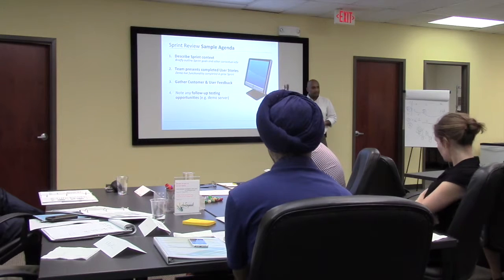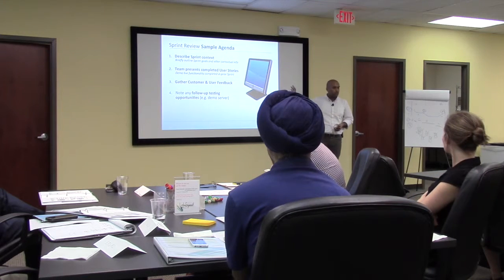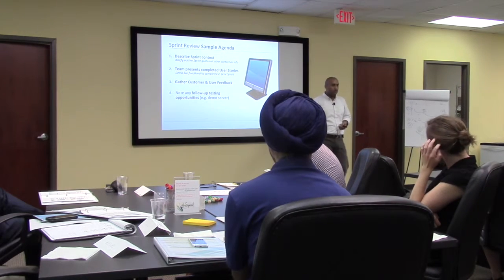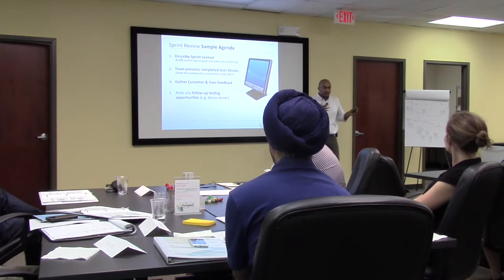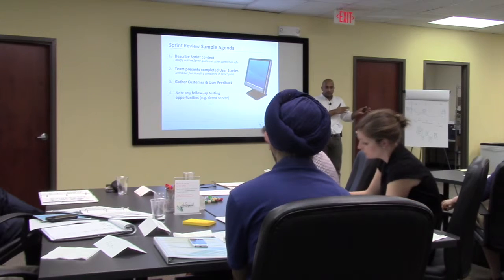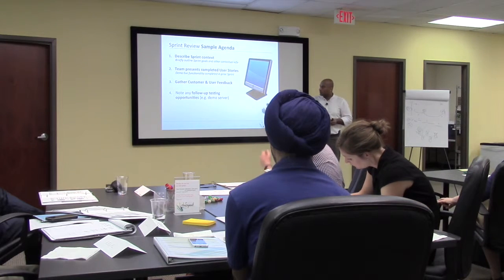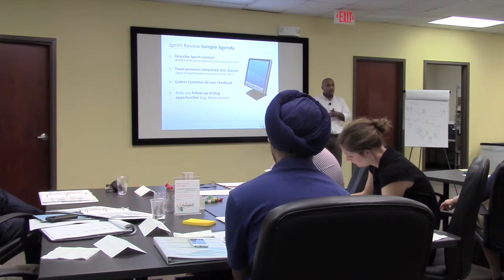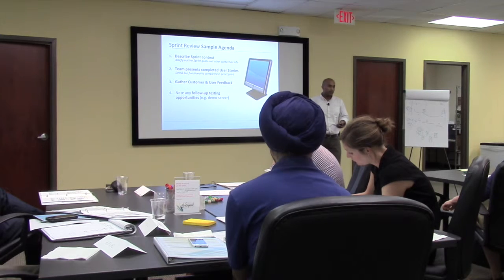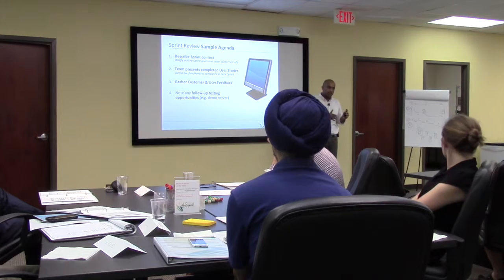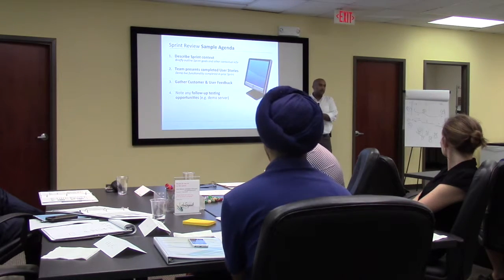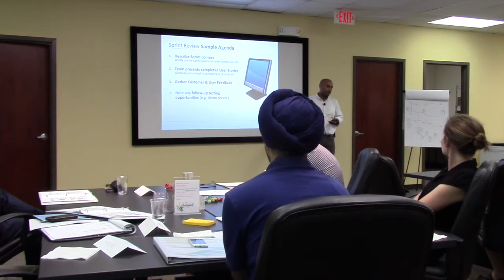And remember, this meeting, sprint review, can be a really valuable input for a sprint planning session. Because any changes that you've made to the product backlog as you continuously refined it, along with whatever comes out of this meeting, will potentially be a good list for what you could work on in the next sprint. So this could be a valuable input from that standpoint, right? That's why I said the sprint review is essentially a meeting to inspect the product increment and potentially adapt the product backlog if needed.